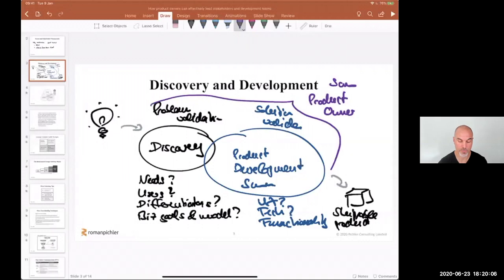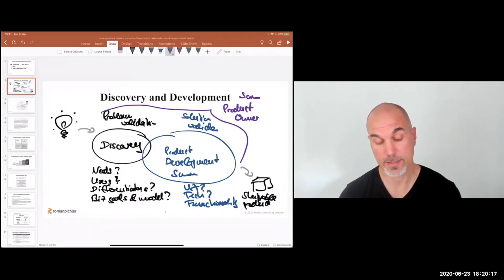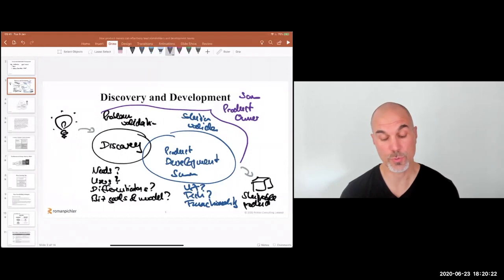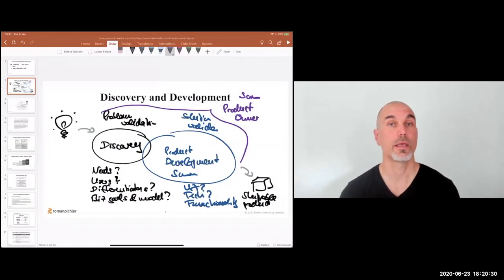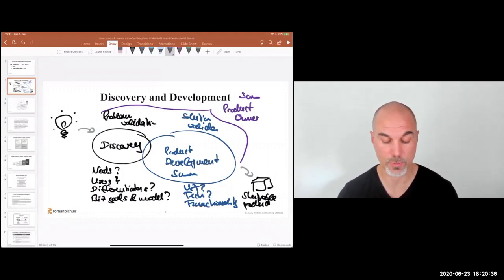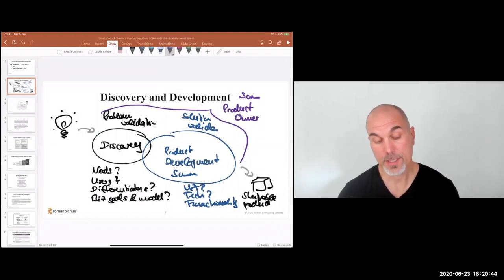So the Scrum product owner is also responsible for discovery. A great way to carry out product discovery is to embrace a collaborative mindset and invite at least the key stakeholders and development team representatives to formulate hypotheses about who the customers and users are, what needs the product should address, what the primary benefit is, and test out those assumptions together.